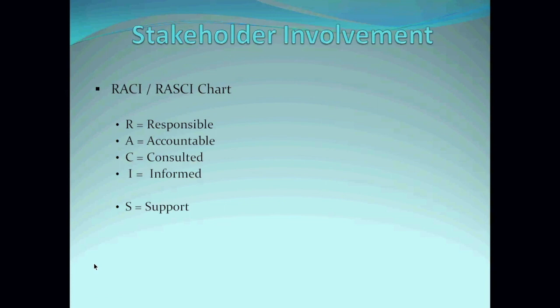Then we can have another task, documenting the requirements, or producing the BRD. BRD means business requirement document. So that's another task. The R will be against the business analyst, because the business analyst is responsible for producing the business requirement document.